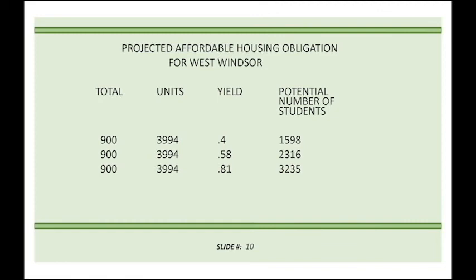And one of the things that's problematic and challenging from a school system perspective is developers get approval, they get the permit, they go. We have to jump through regulatory hoops. We've been talking about Hawk expansion for 2.5 years. Right? We've been working on this. It will take longer to plan and get it approved than it is to build.